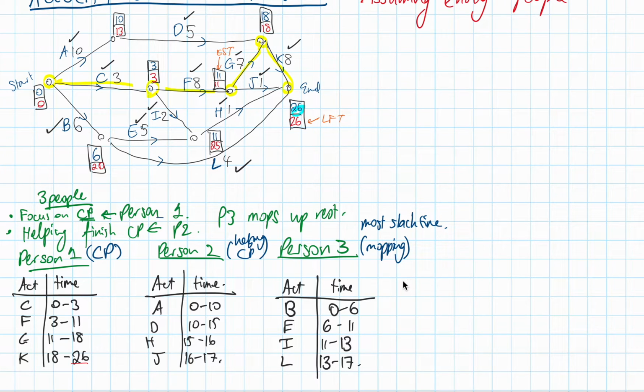Now, we can probably see that if we only had 2 people, this is going to be a lot different, okay? We can see that it actually may impact our job, because if person 2 and 3 are taking 17 hours, it stands to reason that we may be exceeding that if there's only one person helping person 1. So that's the situation we'll look at now.